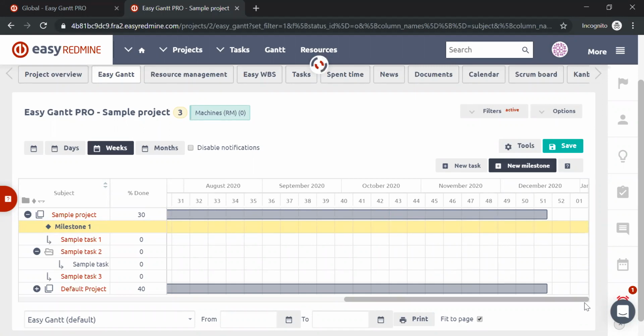If you set a milestone and you set tasks that are linked to the milestone, for instance, the task cannot be moved behind that particular milestone. So even when you are using drag and drop and there's a milestone in your Gantt, you won't be able to drag the tasks behind that milestone that is associated with. So users can be allowed or prevented from moving tasks beyond the associated milestone, and it's a setting that is done in the administration in task tracking.